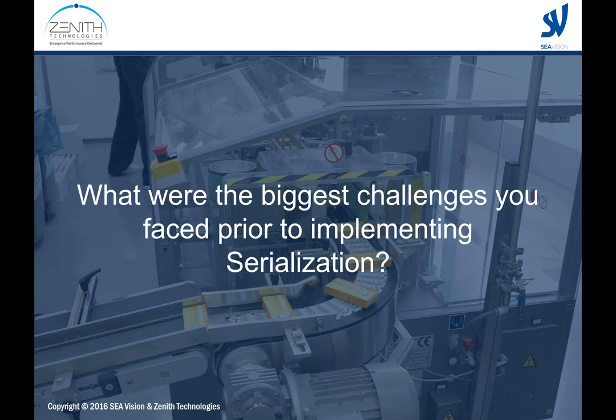So which markets does your company manufacture for? Which products go to those markets? Which sites make those products? And even in fact, on which lines, packaging equipment you use today for packaging those products to those markets. So there's a whole initial phase, sometimes called a project definition, where the first part is to work out what is the scope of the impact for your company.